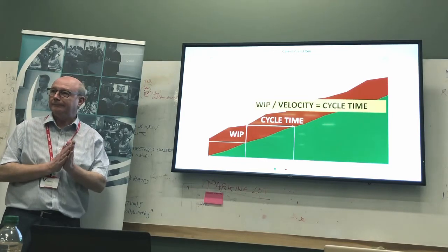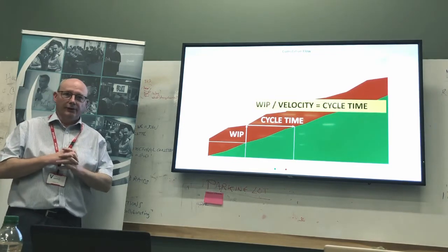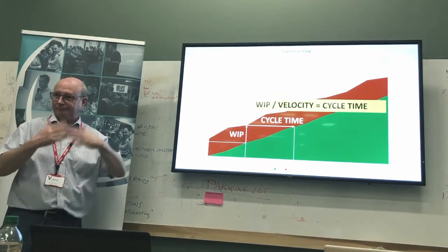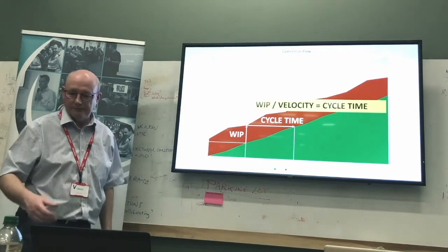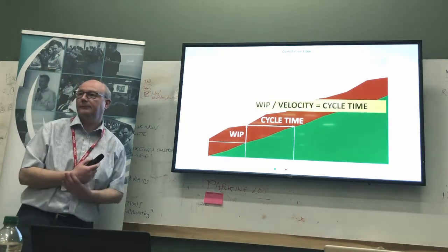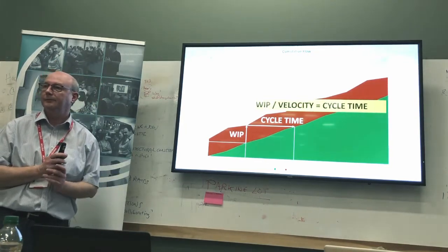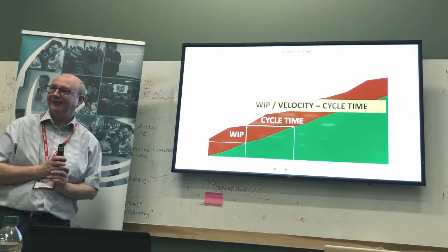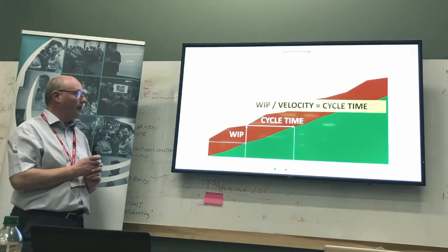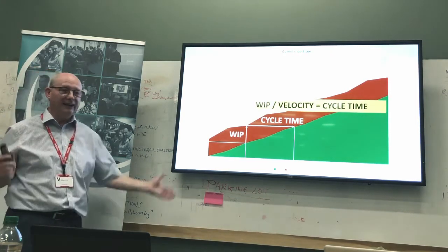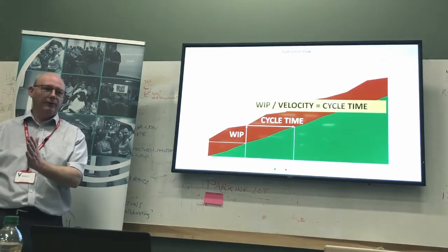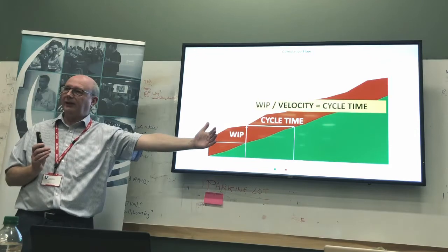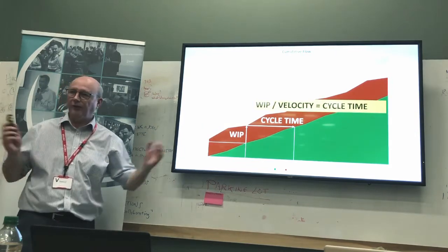And that was great. Not everybody releases that often. We've got some people who are releasing several times a day. So in the Scrum guide, it says that done is basically potentially releasable. So when you're saying done, you mean potentially releasable. That's the key. So done is potentially releasable, whereas lead time is, yes, we are going to do this, we commit to it, to when it actually gets released. So that's a slightly different measure.